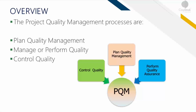It could be the case where customers also provide you a quality assurance checklist, and then you as a project manager make sure you meet those requirements. The second is Manage Quality — this is where you're actually managing the quality processes, translating the quality management plan into executable activities. You need to ensure which tasks require a keen eye for quality checks. Third is Quality Control — the process of monitoring and recording the results of executing the activities.